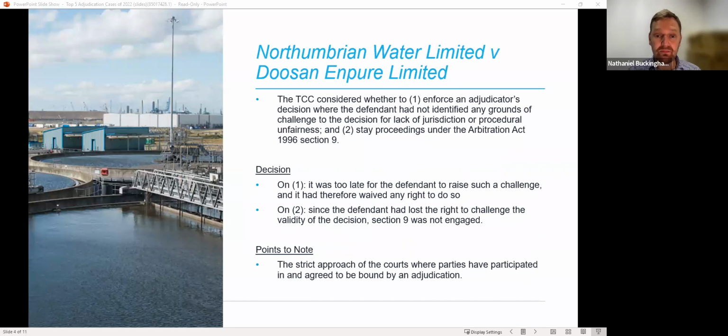The parties agreed that option W2 should apply, which requires that disputes be referred to an adjudicator whose decision was final and binding on the parties unless and until revised by an arbitration tribunal. Now, disputes arose which related to cost overruns, delays, and quality of work. The employer terminated the contract. That termination was disputed by the contractor, who submitted that the employer was in repudiatory breach. Now, repudiatory breach means a significant breach which would allow the contractor, in turn, to actually terminate the contract.